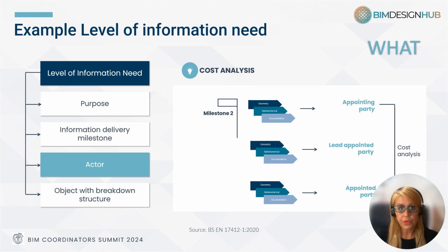Next, the actors who will request and deliver information should be identified. The same level of information need can be required by different actors at the same milestone to fulfill other purposes, as shown in the example here. For the cost analysis, all parties require the same level of information need at milestone 2.